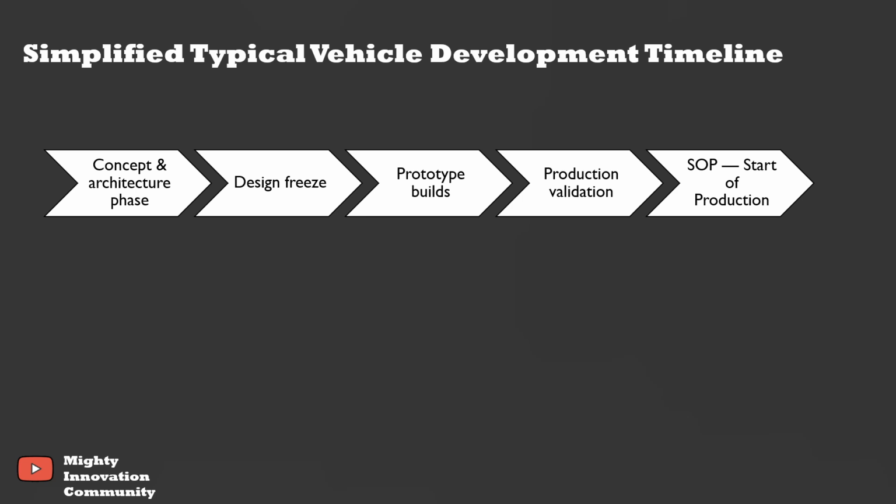Once vehicle design freeze happens, OEMs freeze part geometry, interfaces and packaging. From this point, the supplier can start tooling. Design freeze is the starting gun for part level tooling activities. FOT, first off tool, usually happens once we are able to produce the first set of production intent tools or the parts from those tools. This is the first real physical part coming out of tooling. Sometimes if FOT is delayed, prototype or soft tool parts are used as an alternative.